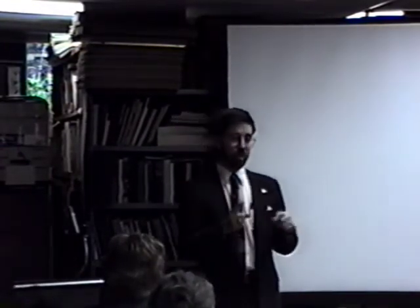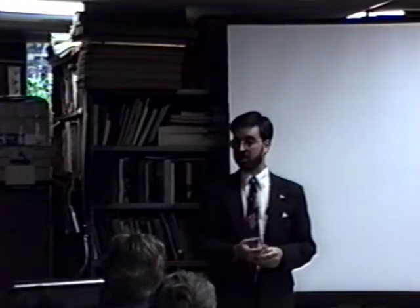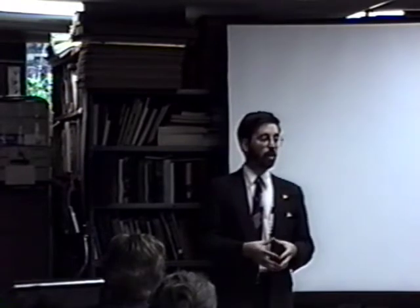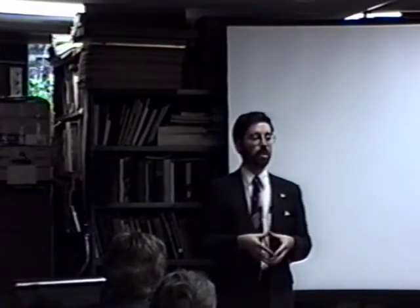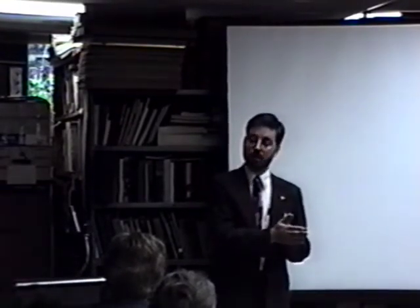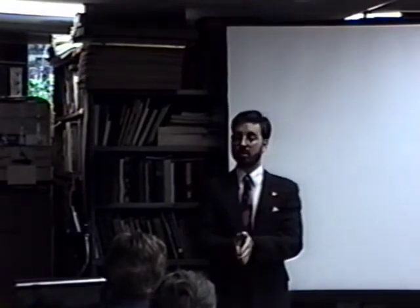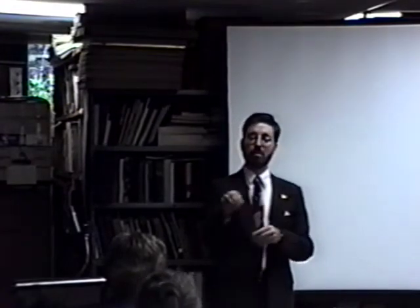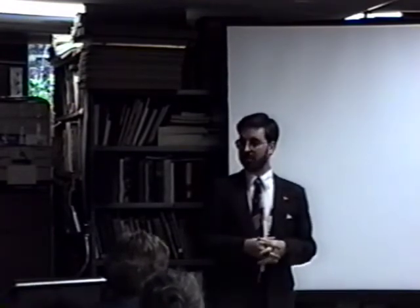And just to give you my background so that you know where I'm coming from, I am an architect and have specialized in preservation work, but I'm serving as the owner's representative. I'm a preservation coordinator, and I serve in the traditional role of clerk of the works. So I'm documenting all the work that's going on, but I also coordinate the restoration with the architect that we have selected and with all the craftsmen that we've selected. So it's a very unique position where I'm basically the owner's representative, but I work very closely with the architects and the contractors. Sometimes I refer to myself as the three-legged beast, because it's very rare to be able to work within each of those portions within the traditional project.